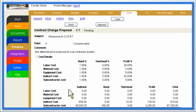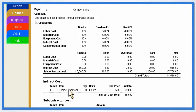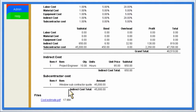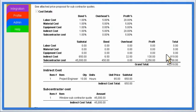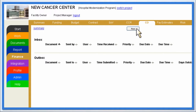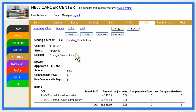Before approving them, construction managers can review the proposal's cost breakdown, any supporting documentation, and the total dollars to ensure that they are not being overcharged for additional work. Change orders, comprised of multiple approved price proposals, will automatically list approved CCRs.